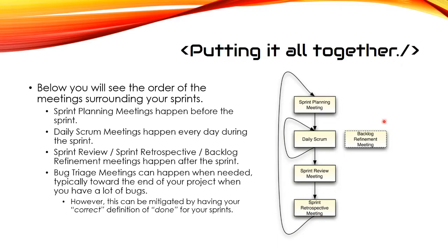Now, this backlog refinement meeting, you should have that before the sprint planning meeting so that you know the order of items in the backlog that you need to go through, so that you can grab the ones that you want for your next sprint planning meeting.